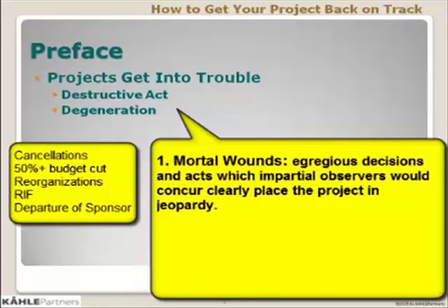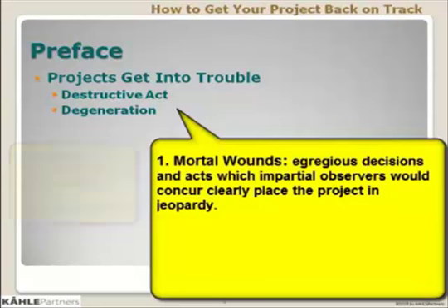Another destructive act is to cut the budget by 50% or more. There could be reorganizations or reduction in force, which will affect multiple projects, not just this particular project. Or the project sponsor can leave the effort. They can leave the company, they can move into a new role, they're no longer sponsoring the project, whatever. These are all such material actions that they automatically jeopardize the good standing of the project and place it in doubt as to whether it will ever deliver.